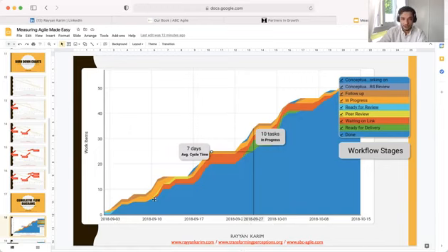What we've also got, and this is where the different colors come into play, are the different workflow stages, meaning the item started, first of all, not in the example that you've seen on the screen, but maybe in an example you're more familiar with. It will start in the backlog, then it will be ready, then it will be in progress, then maybe you're going to have it in review, and then it will be done. And that is your value adding process.